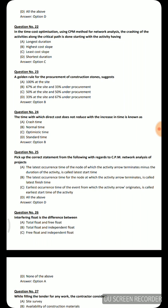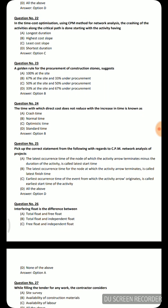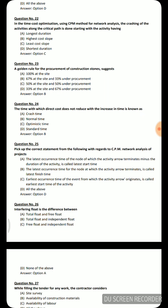Next question: Pick up the correct statement regarding CPM network analysis. Option A: latest occurrence time of the node at which the activity arrow terminates minus the duration of the activity is the latest start time. Option B: latest occurrence time of the node at which the activity arrow terminates is the latest finish time. Option C: earliest occurrence time of the event from which the activity arrow originates is the earliest start time. Option D: all of the above — which is the correct answer.